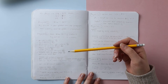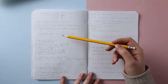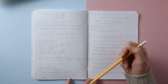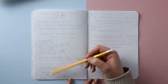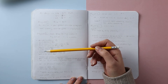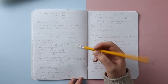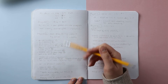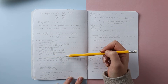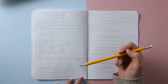Project two — moving my shop to my website — was a bit more in depth. I want this done by the 27th of May, which gives me seven weeks to complete it and there are quite a lot of individual tasks. I started writing them out in whatever order I could think of them, then went through and numbered them in pencil, because inevitably I'd get so far through and then realise there's something else I wished I'd slotted in, so I could rub it out and adjust the numbers. I also realised that the task of retaking product photos actually had two more tasks associated with it, so I ended up with 10, 10A, and 10B to avoid redoing all my numbering.